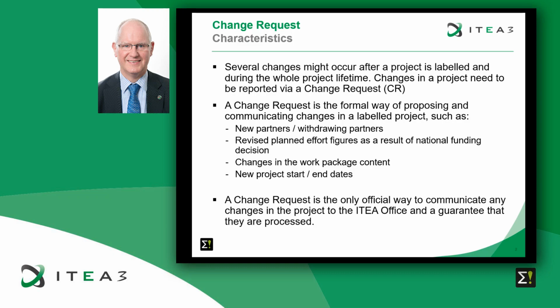A change request is the formal way of proposing and communicating changes in labeled projects. This can be, for instance, new partners coming into the project or partners leaving the project. There can be revised planned effort figures and also cost figures as a result of national funding decisions. There can be changes in the work package content, but also work package leaders can change. There can be a new project start, end dates can shift. All these kinds of changes can be reported via the change request.